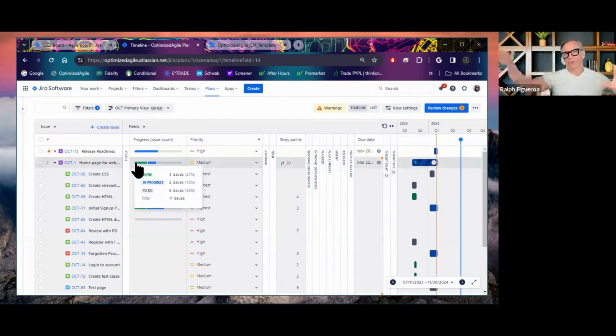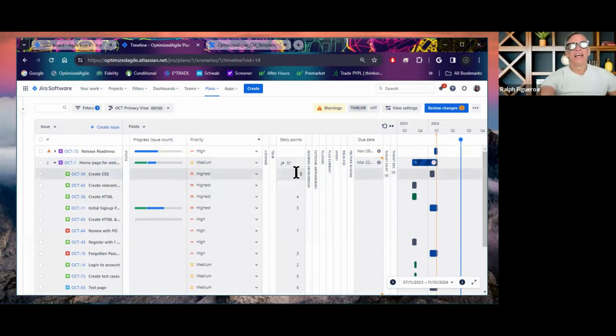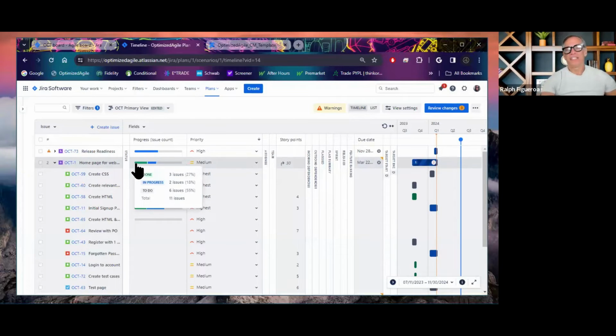What happens is that normally people create epics that contain the stories for multiple releases. So it's like a multi-release, extended epic. Yes, it will summarize the story points and the progress, but it will not be in the context of that particular fixed version because you have mixed fixed versions in it. So you cannot rely on that number accurately to say we are 27% done.